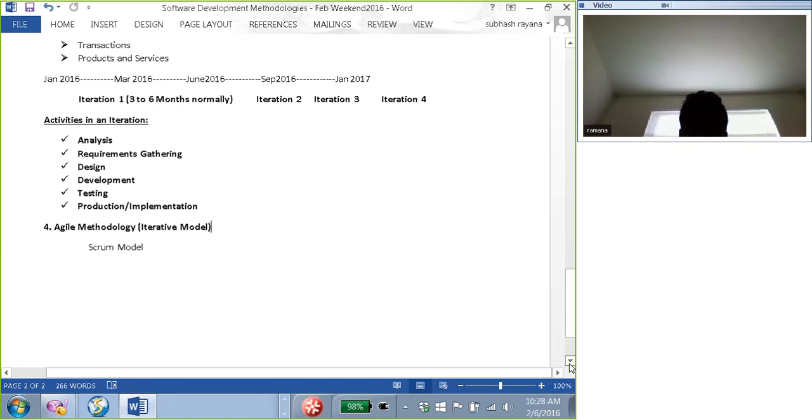As of now, the project's requirements are complete and design is 20% complete. Next week, design is 60% complete. Next week, design is 100% complete. In this way, they keep tracking the project status, and the project status at a high level is represented in 3 colors. I repeat, the project status is represented in 3 colors: green, yellow, and red.